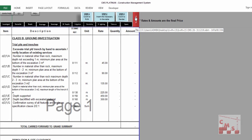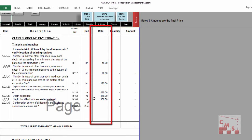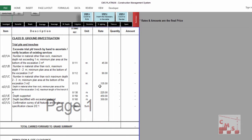We have a note here that all the rates which will be inserted here in this POQ will be the final price. That means you have to insert here the price which you will sell your project with, not only the cost, because this POQ is the final POQ which will be presented for the clients.